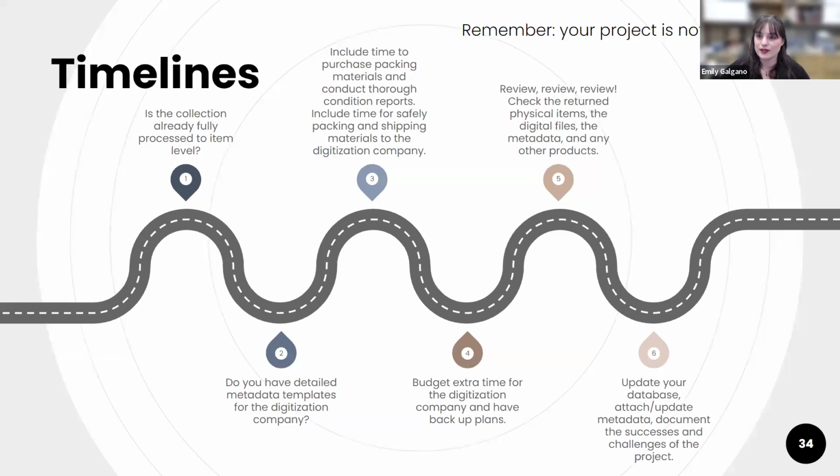Okay, now for timelines. I really want to emphasize here that this project that you're applying for is very likely not your only task. When you are awarded this, it is much more likely that you will have to continue to attend to your regular duties and your other duties as assigned. So when you're making your timeline, don't just measure how long it takes you to scan one photo and scale that up to the number of photos in your collection and decide that you can do that for 3 hours every day for the next 6 months. That can be a good starting point, but it only really scratches the surface.